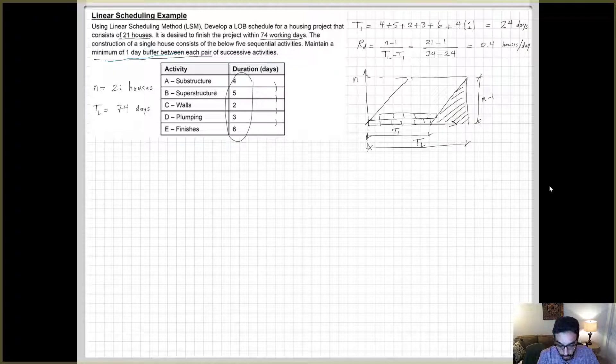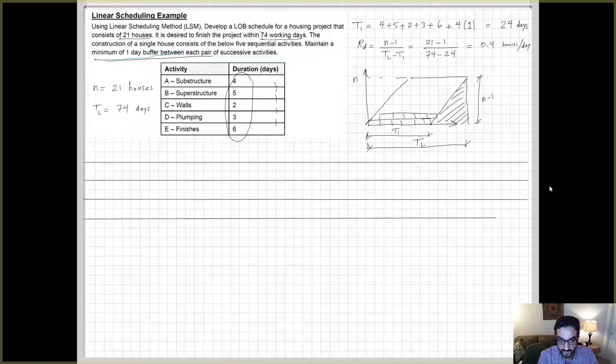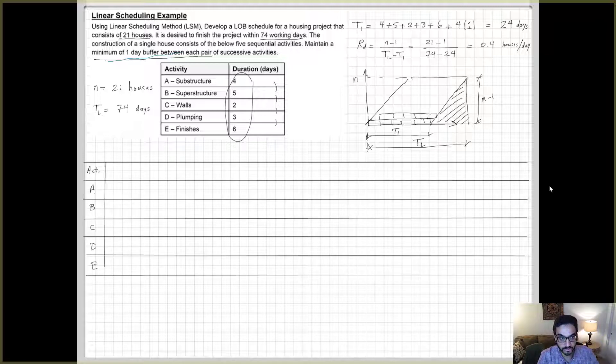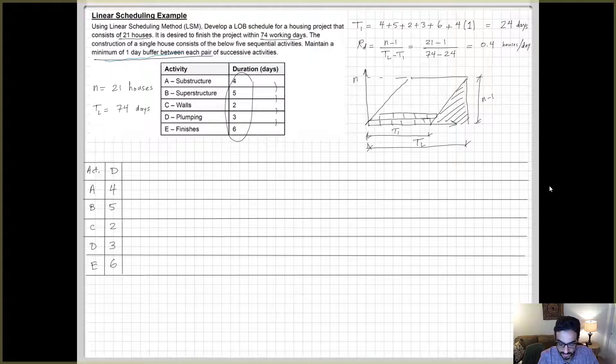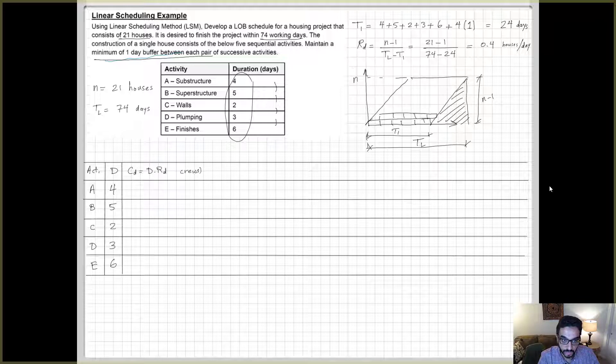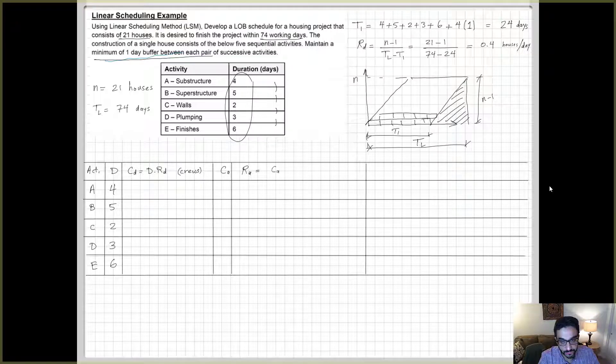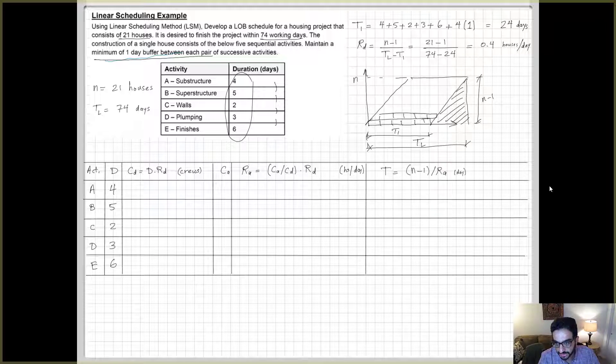To move forward in the problem and draw the line of balance diagram, I need to prep values for me to be able to draw the diagram. So this is the table that we're going to use. I will list all the activities and their duration, and then I will have the following columns. So we need to calculate CD, CA, RA, T, and then of course the buffers are given to us. I'm listing them here to be handy when I look at this table at the next slide and start drawing the line of balance diagram.